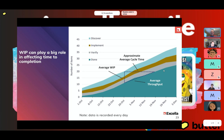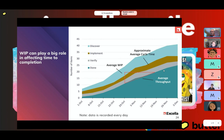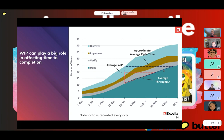WIP can play a really big role in affecting time to completion. I've changed the CFD slightly — I added more stuff to discover, so the discover band has gotten larger. What is the consequence of that? When you have more WIP in your system, your cycle time increases. You probably hear Agilists talking about this all the time: the more items you have in your system, the longer it takes for any single item to complete. This is the graphical representation of what's happening.